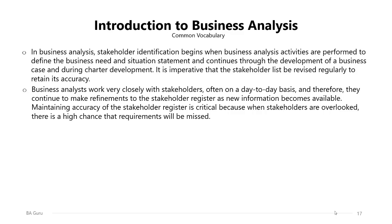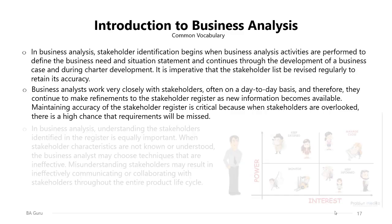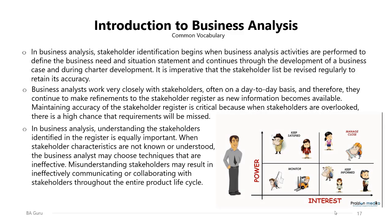Maintaining the accuracy of the stakeholder register is critical because when stakeholders are overlooked, there is a high chance that some requirements will be missed — something the business analyst should avoid. Understanding the stakeholders identified in the stakeholder register is equally important. When stakeholder characteristics are not known or understood, the business analyst may choose techniques that are ineffective, and misunderstanding stakeholders may result in ineffective communication or collaboration.